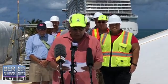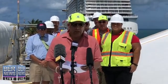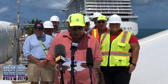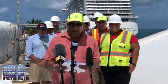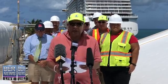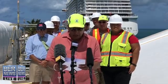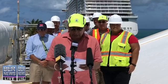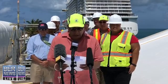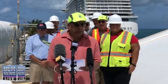Planning began immediately to explore options and new methods to meet that limited timeline. The ministry initiated an accelerated replacement program in order to meet the critical deadline of April 10th, 2019, the arrival of the first cruise ship of the season. The consequences of missing that deadline would have incurred a $500,000 penalty for every visit that a ship could not dock at King's Wharf.